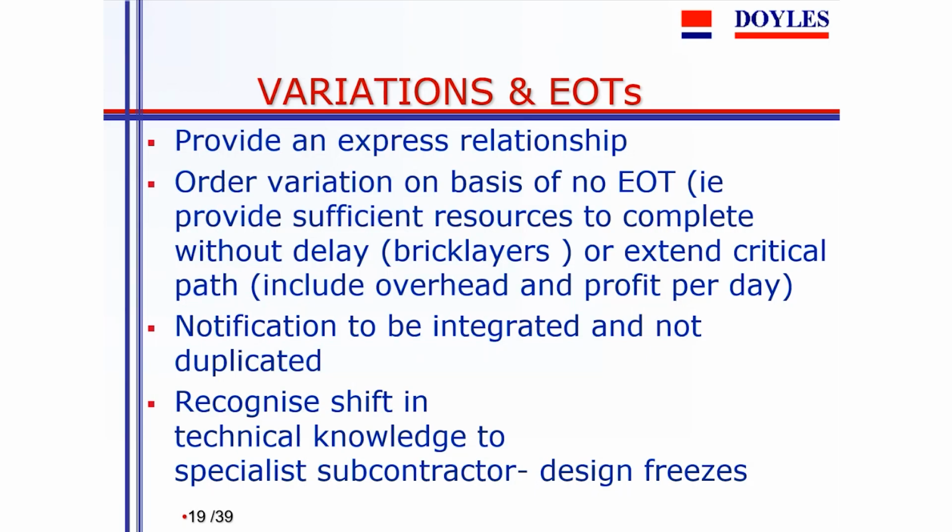But if that contractor has already committed himself to other work and therefore can't schedule that 10% of work into a program, if he has to say, well, look, I can't do it for 4 weeks, then the circumstances of variation and EOT are very much intermingled, and you've got to be careful to do it.